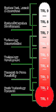The original NASA TRL definitions were: Level 1 — Basic principles observed and reported; Level 2 — Potential application validated; Level 3 — Proof of concept demonstrated analytically and/or experimentally; Level 4 — Component and/or breadboard laboratory validated; Level 5 — Component and/or breadboard validated in simulated or real space environment; Level 6 — System adequacy validated in simulated environment; Level 7 — System adequacy validated in space.